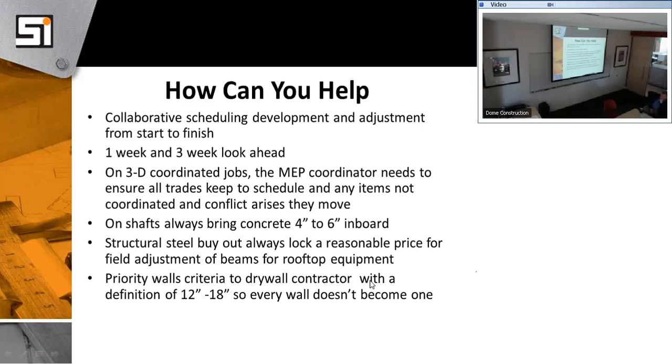For me, it's just shafts. I always see bringing in that concrete, because that's where we're setting all the supports for ductwork, and sometimes you see our big steel going into the wall and you're caulking around. That didn't happen. We talked to the architect and told them, but it didn't get communicated to the structure. So those things you can help during the design process, make sure it's covered before it becomes a field problem.